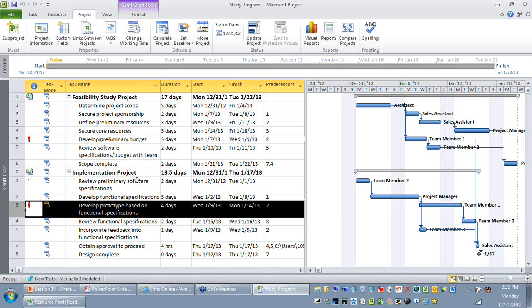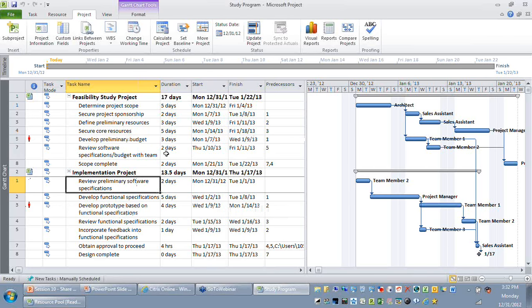But as a program manager, you need to ask, do you have the authority to change the duration estimates or the schedule of the individual projects? If the answer is yes, naturally you can edit these values. But if the answer is no, maybe you should not edit these values, or these two files which you are trying to open within this program should only be in read-only mode.